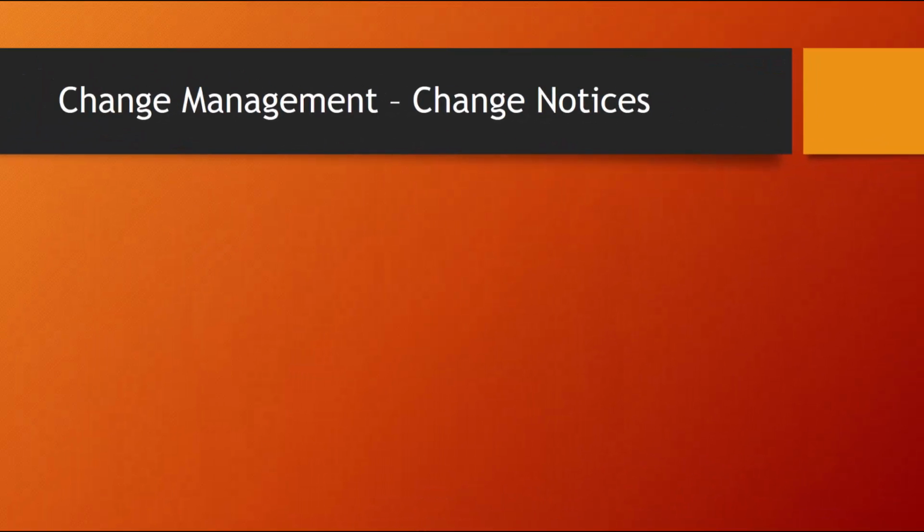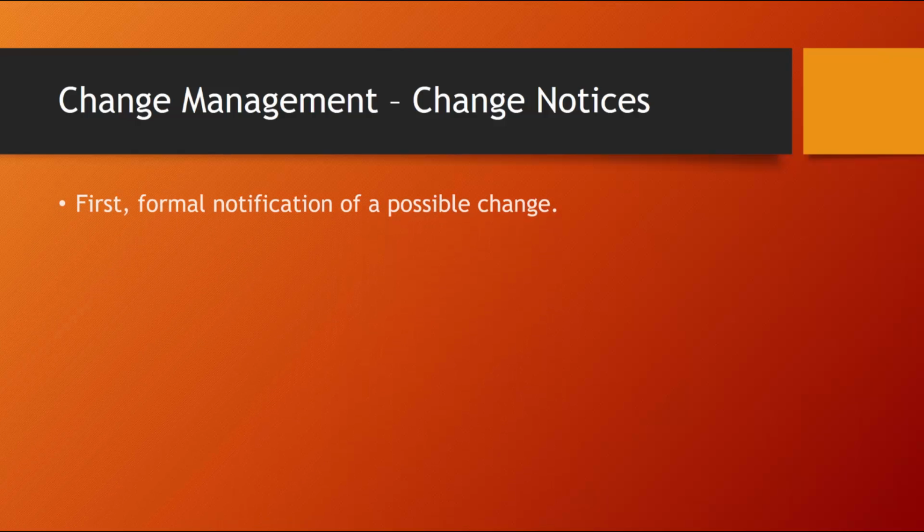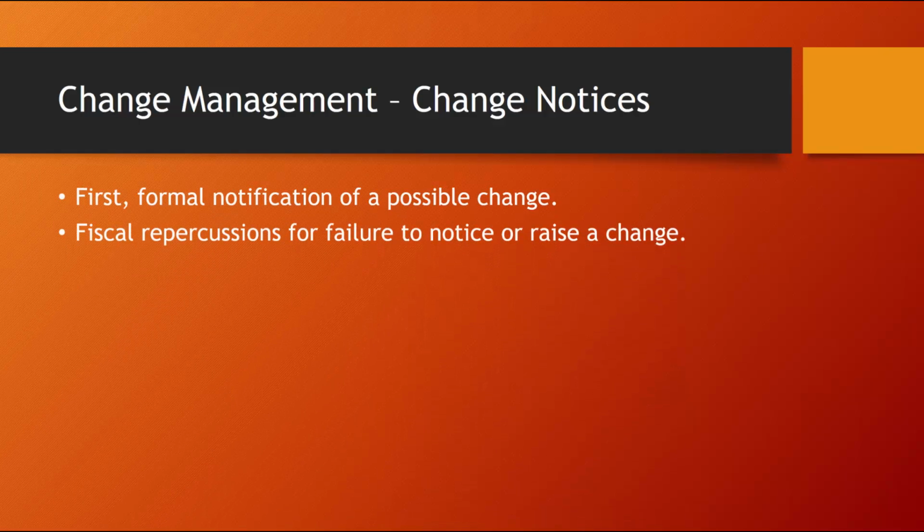Let's begin by looking at change notices. A change notice is normally the first formal notification of a possible change sent from the client, contractor, or subcontractor to the client. Depending upon the conditions of the contract, there may be fiscal repercussions for failing to notice or raise a change to the client within a specific time frame.